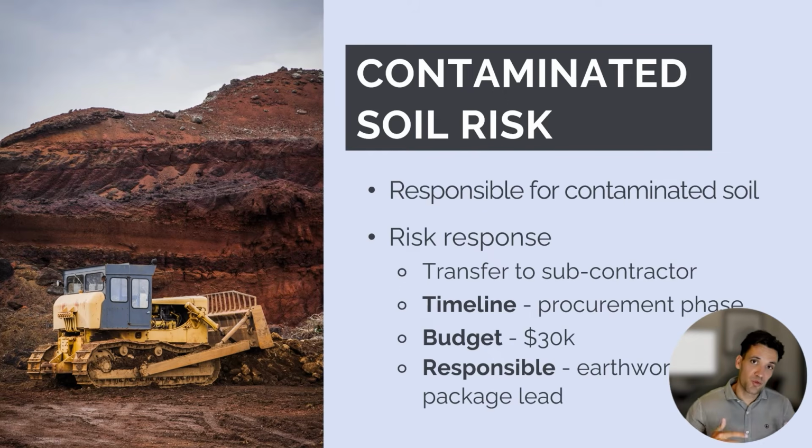So we're responsible for dealing with contaminated soil in our project, but we don't know how much contaminated soil there is. So what do we decide to do? We decide to manage the risk. We want to transfer this responsibility to a subcontractor.